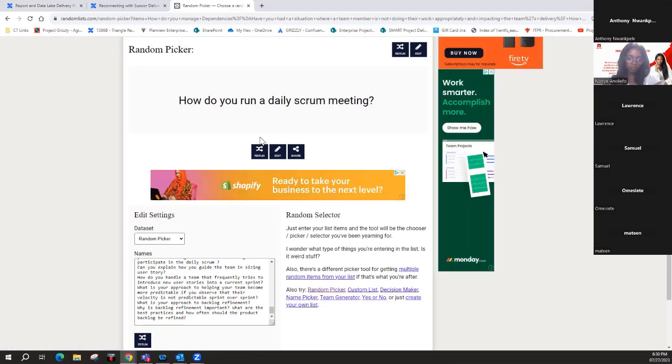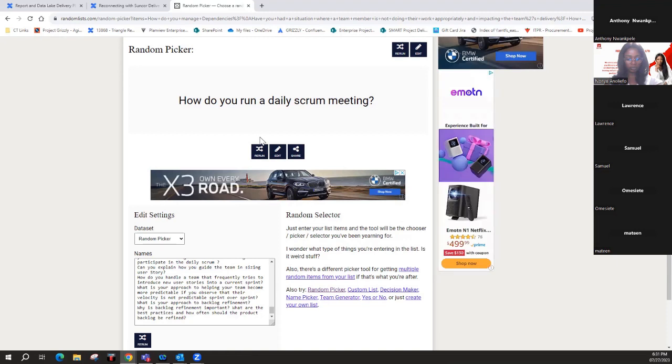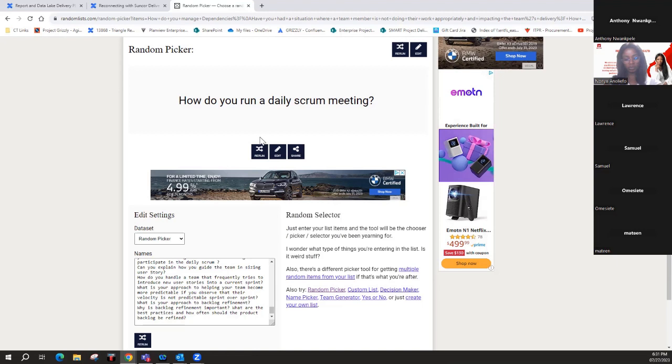So the purpose of a daily Scrum is to inspect the progress towards the sprint goal and adapt the sprint backlog as necessary. To start a daily Scrum, you start by asking the 3 questions: what work was done since the last stand-up, what work will be done or accomplished, and whether there are any impediments blocking the team. I think that's basically how you run a daily Scrum, and the people who have tasks to do are the ones who speak in a daily Scrum. Basically.